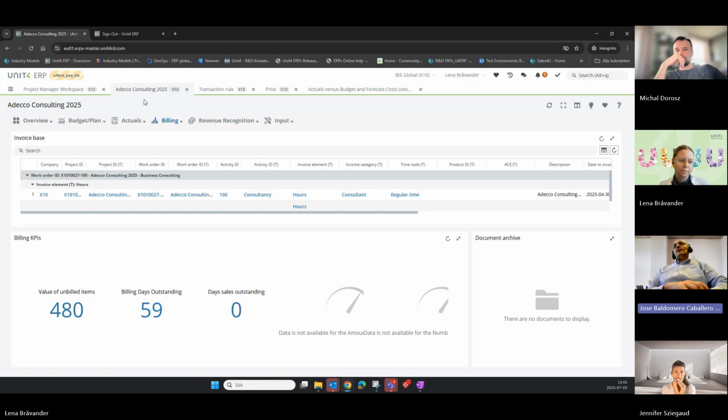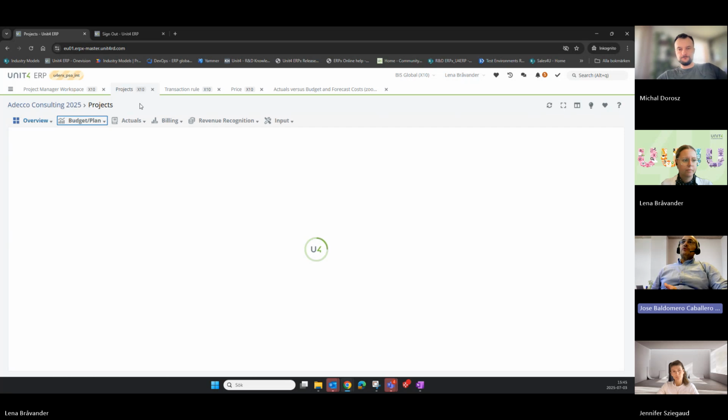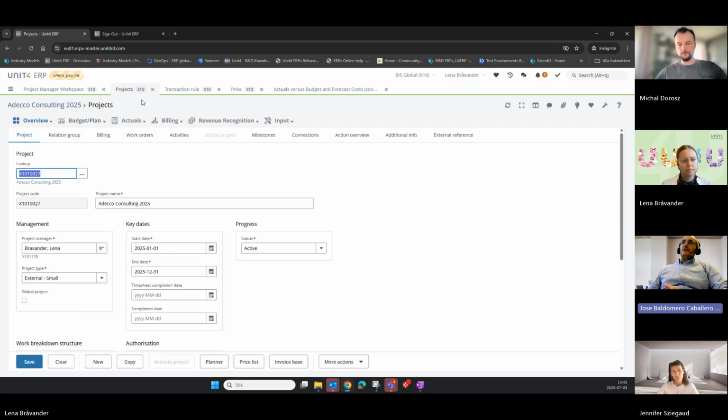So if we go to the project life cycle, when you initiate the project is when you will create the baseline. And then the forecasting is what happens after. It means the project is running, your people are working, and then you want to do the forecasting.